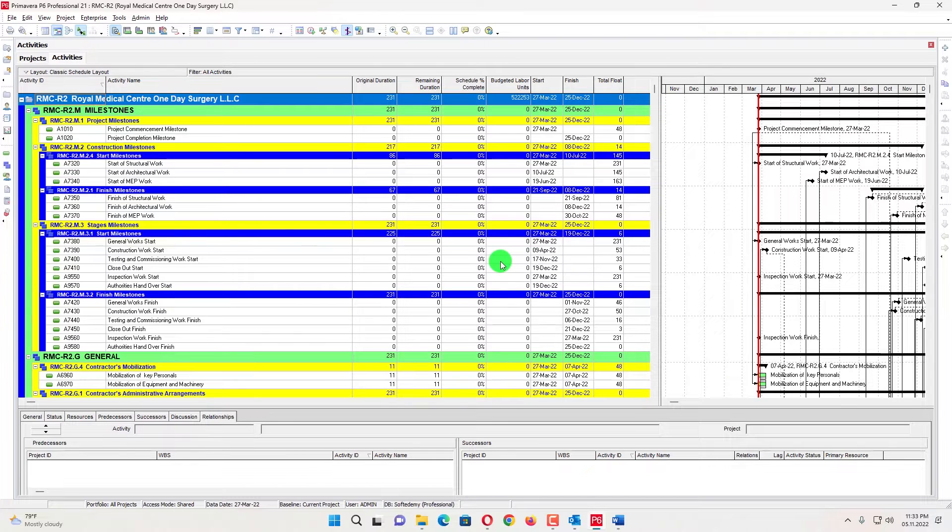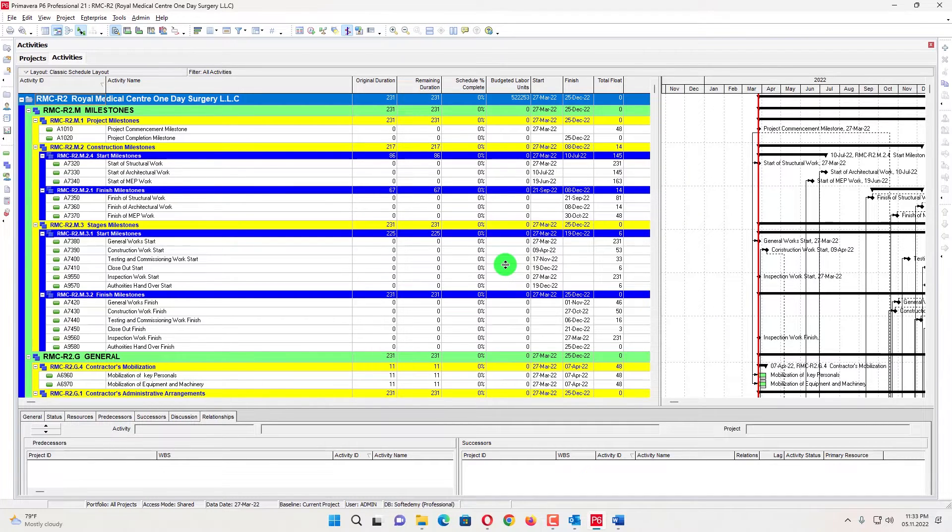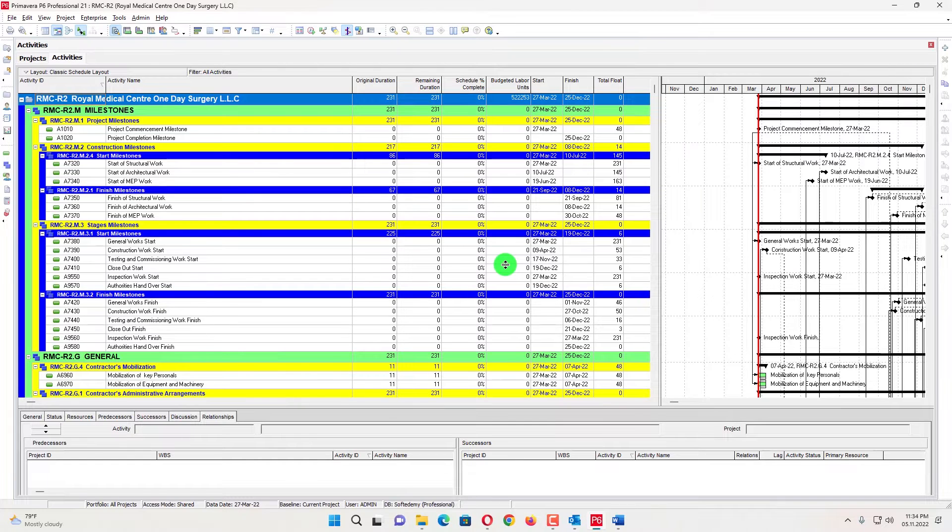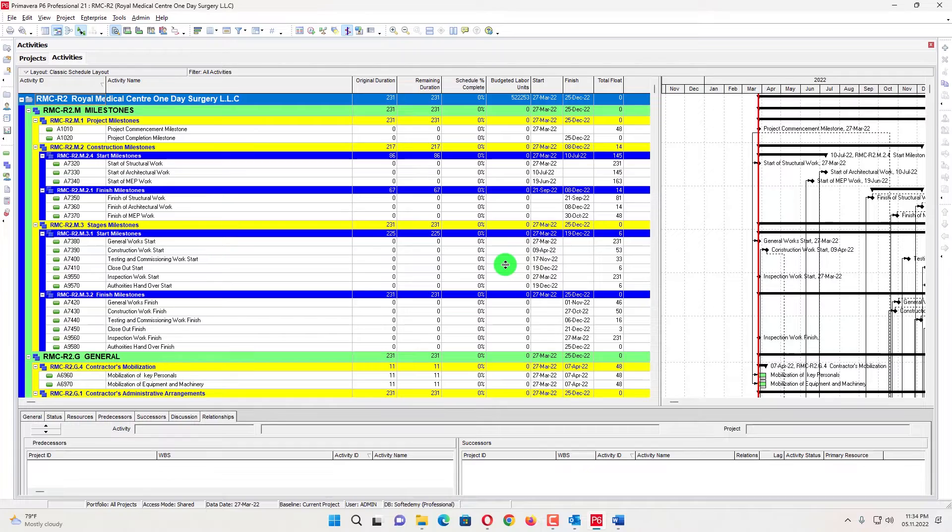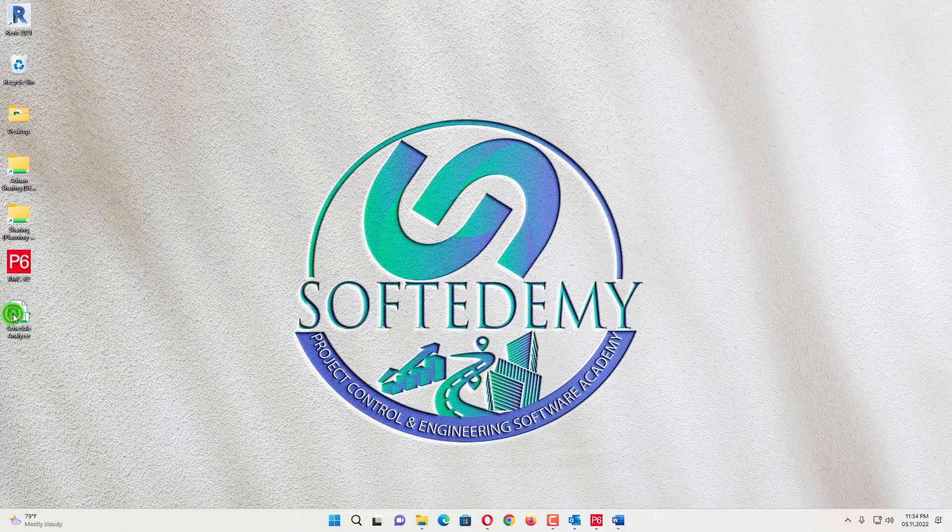There are a lot of checklists for that one, but the basic checklist which has been derived is DCMA 14 checks. So we will do that one. We cannot do that one individually and we cannot generate a report. It will take too much time. I have a tool here, a schedule analyzer on desktop.